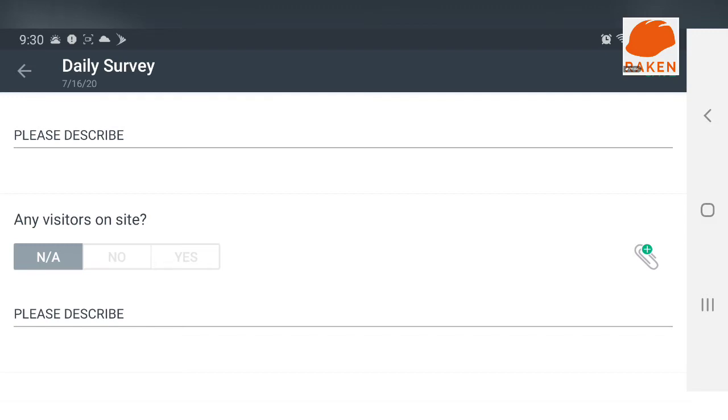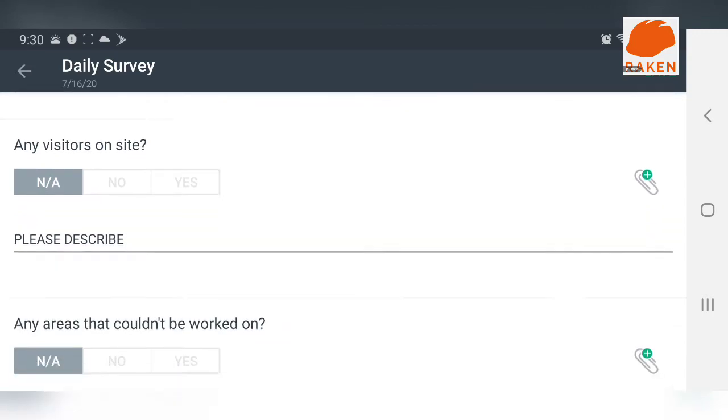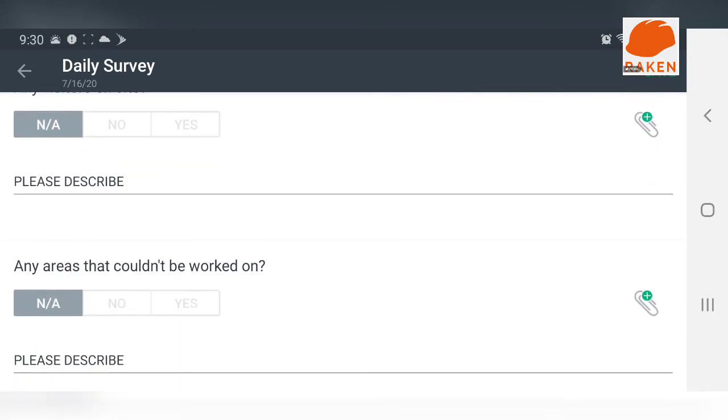And you can take pictures and all the pictures are time-locked, so time-stamped. So when you take a picture in this app, it will time stamp the time. So if the truck was supposed to be there at nine o'clock in the morning and it showed up at four in the afternoon, you take a picture. There's no ifs, ands, or buts about it. It showed up at four o'clock in the afternoon and your guys can get started. Basically you waste the whole day, but you can cover your butt with this.